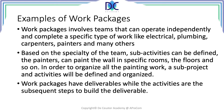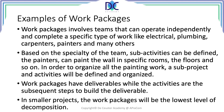The work packages have deliverables, and the activities are the steps to build the deliverable. Basically, this is a mini project — we have to paint different elements, and they can be done in parallel or one after another, giving different possibilities to plan. In smaller projects, the work packages will be the lowest level of decomposition and will essentially be at the same level as the activities.